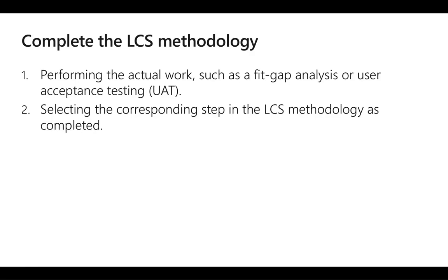Customers must complete the analysis, design, develop, and test phases in the Lifecycle Services methodology before the configure button, which is used to request the production environment, becomes available.